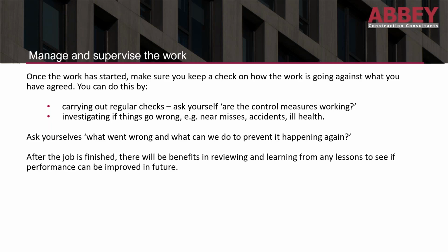Investigate if things go wrong, such as near misses, accidents, ill health. Something's gone wrong, something's not been identified, a risk is being missed. So there's a need to do more work to address those shortcomings. Ask yourself, what went wrong and what can we do to prevent this from happening again? After the job is finished, there are always benefits in reviewing and learning lessons to see if performance can be improved in future.